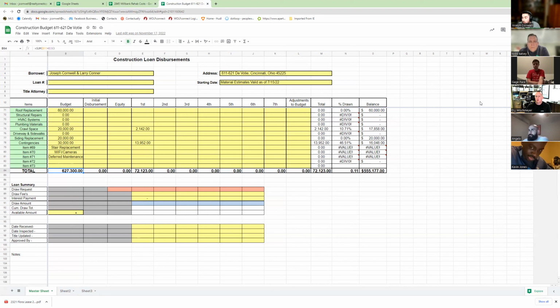On my employees, if I don't make a 40% margin on our labor and material costs in-house, then I'm basically not going to have any profit, because I have to cover all the overhead that's associated with that. Right.